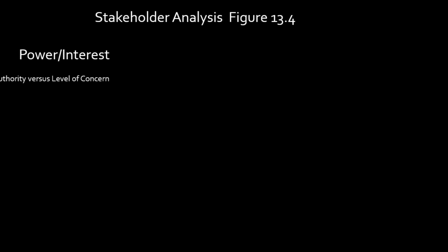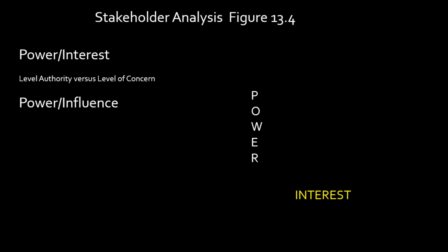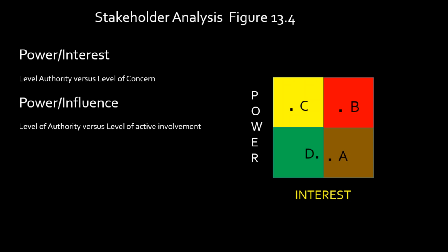So let's talk about some of the stakeholder analysis. What they really want you to do here is, in PMBOK, they point out some matrixing. We can actually start to rate your stakeholders, almost like we did with rating our risks: high risk, medium risk, low risk. Same thing we talk about here, high interest, high power, high this, low that, right? In comparison. And we can be looking at our stakeholders in all different ways, all right? But this is one of the tools that you can use, okay?